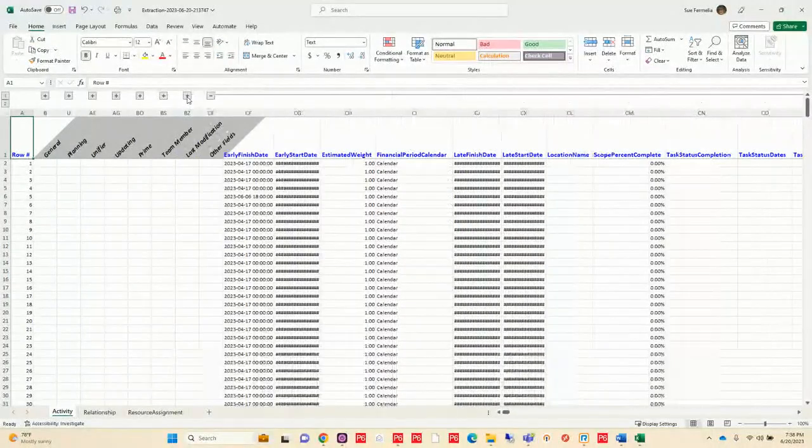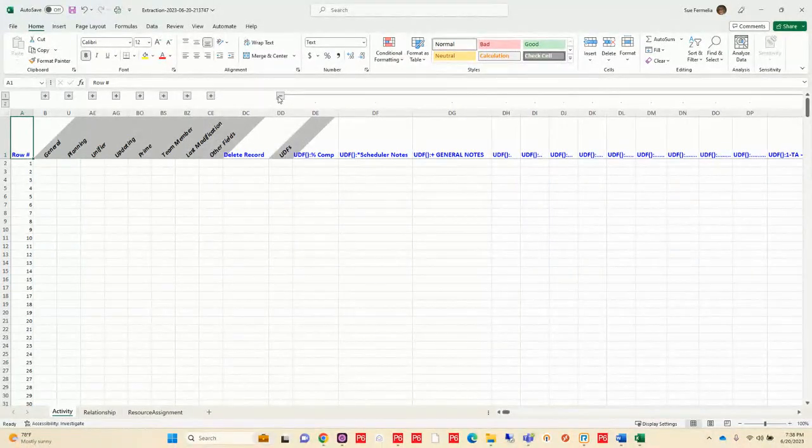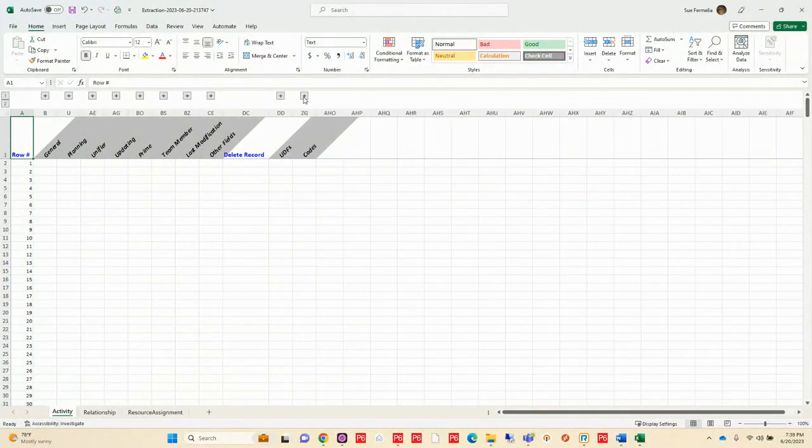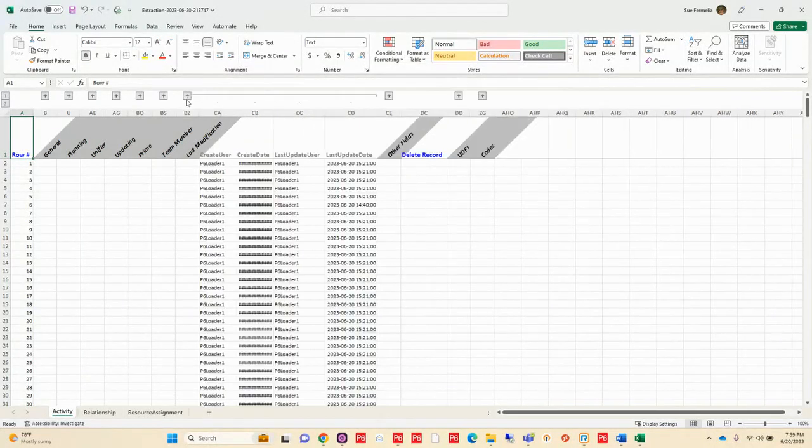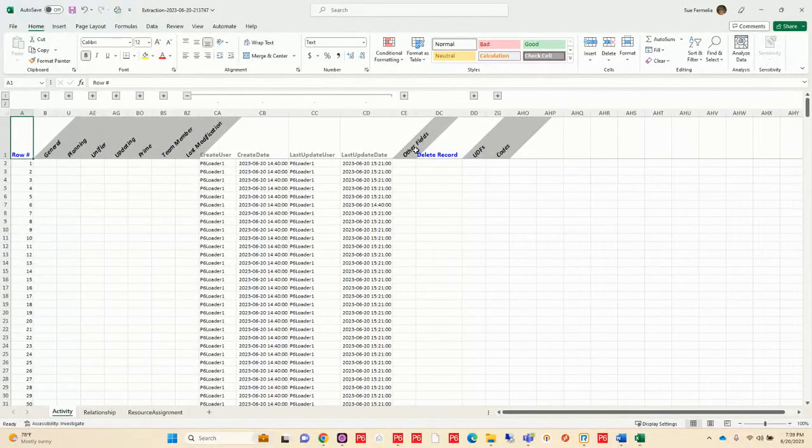So there's a lot of information on activities, and it pulls out everything. In our demo database, we have so many different examples. Actually, I think it's last modified. Last modification is here. There we go. So then I would be able to take my last update and filter on that for the timestamps between the backup and when I discovered my issue. And then I could load up what I needed to restore that information on my project.